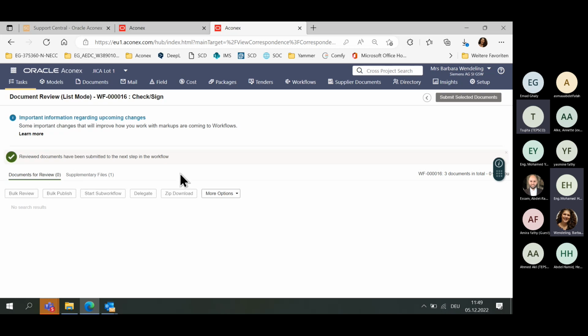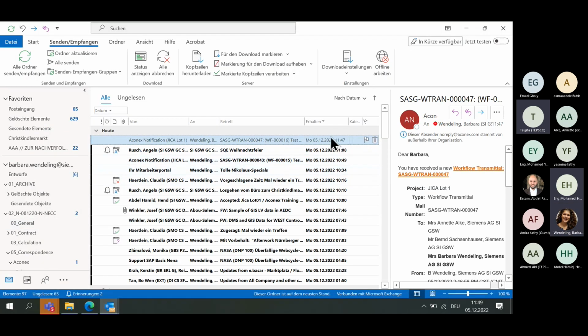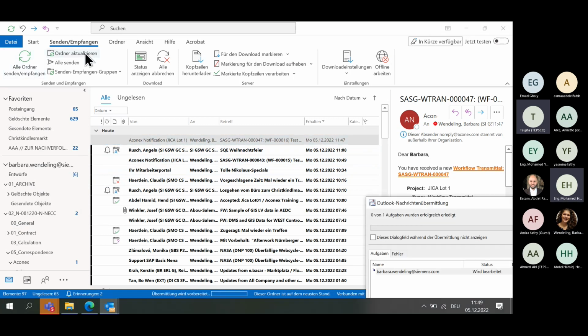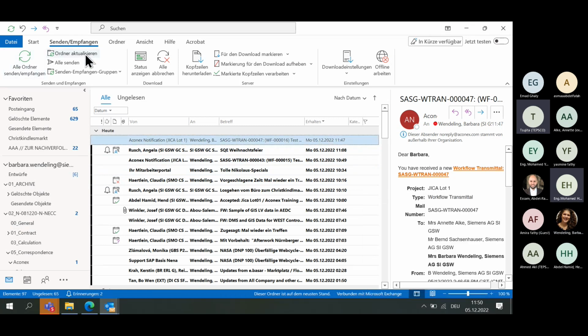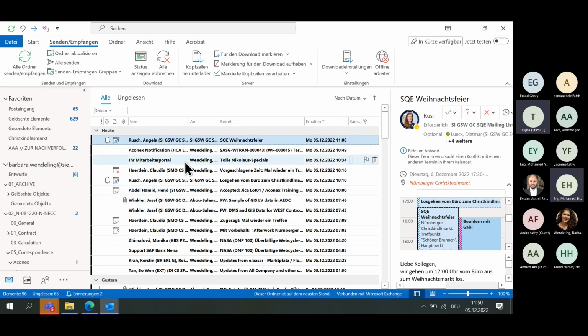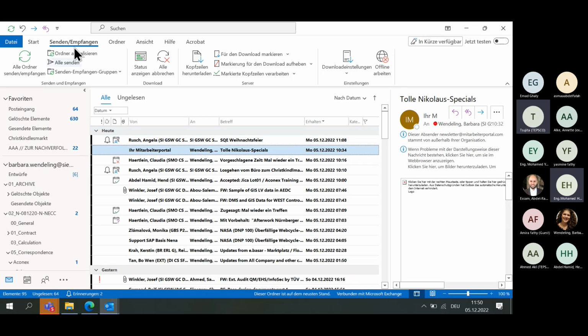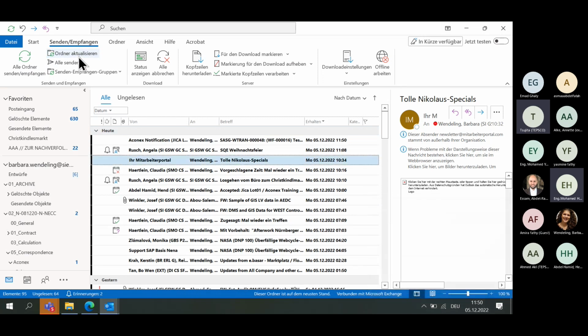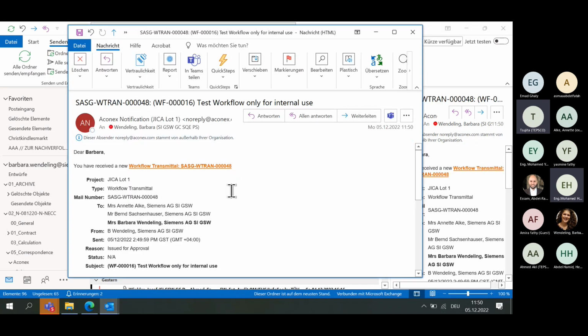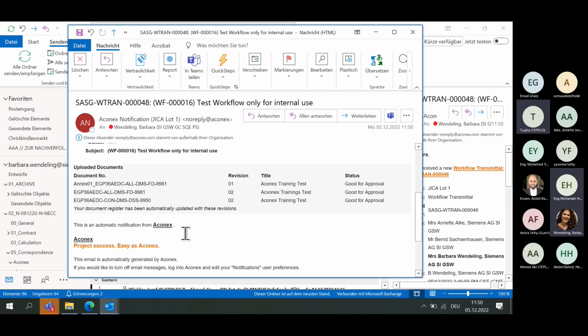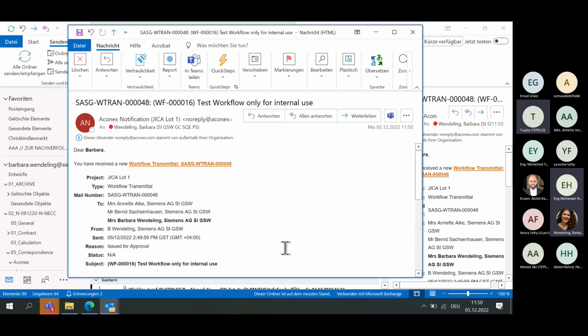So that means review 1. This is when the customer and engineer receive the documents for review. We decided that we will set here also as a review outcome, continue to the next step. That means I will get a notification email. Now we have it. We can see now, okay, there are coming an annex and 2 documents.